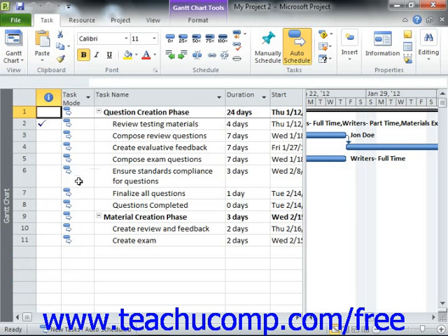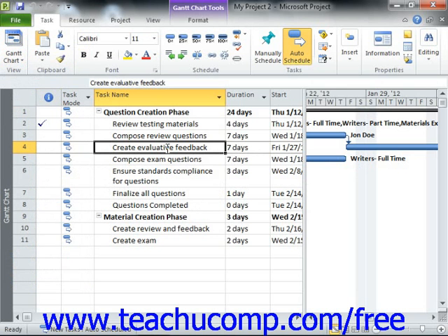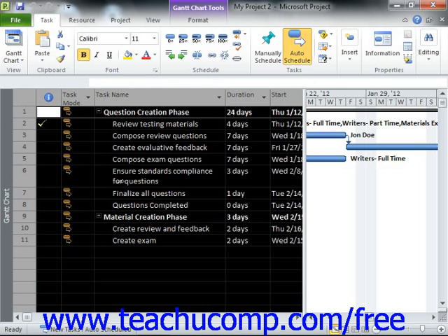First, you need to be aware of the fact that your formatting will only be applied to whatever you select within the view. For example, if you want to edit the color of a particular bar within the chart, you can click into the row of that task in the Gantt chart to select it. As another example, if you wanted to change the color of text used in a cell within the table view, you need to select the cell or cells to format first. If you wish to select all cells in a project view, you can click the small gray square that appears in the upper left corner of the Gantt chart view to select everything in the view. Using this technique can make large universal formatting changes easier to apply.